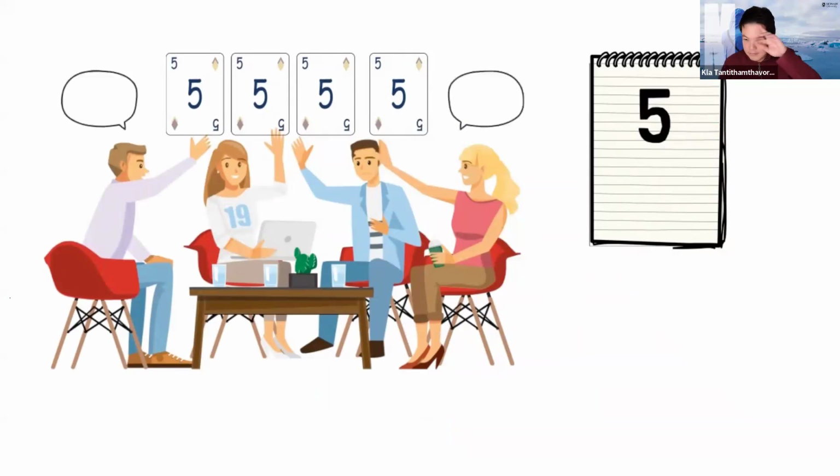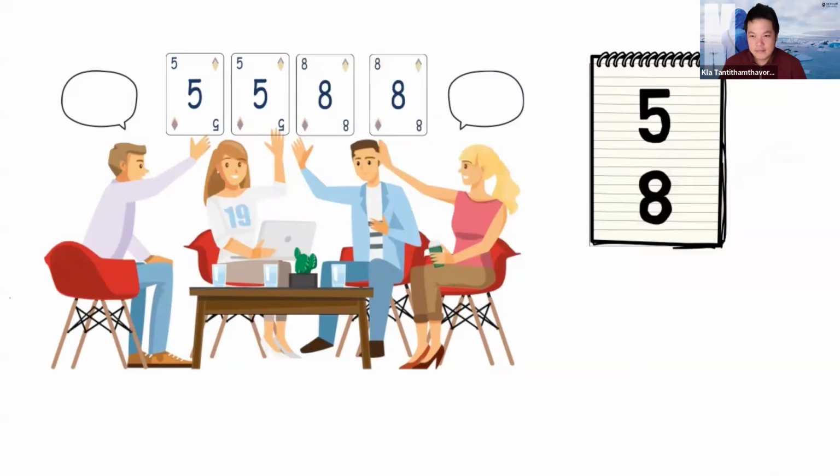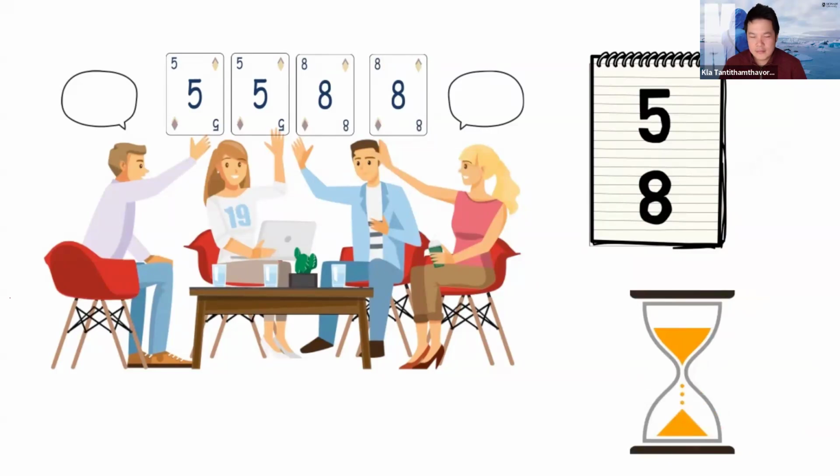When there is a tie in the voting between two consecutive sizes, for example 5 and 8, just pick the larger size and move on. It saves a lot of time and also saves the team from the perils of running out of time due to an underestimation of the size of the task.